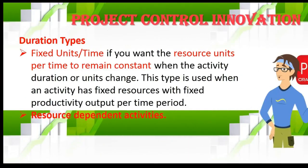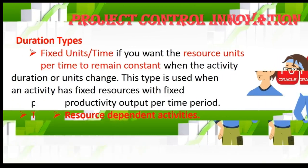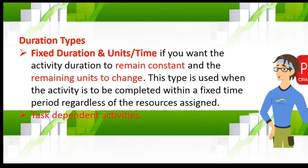Fixed Units/Time: if you want the resource units per time to remain constant — meaning the resource is constant — and the activity duration can change, use this one. This is a resource-dependent activity. Fixed Duration & Units/Time: if you want activity duration to remain constant and the remaining units to change, use this one — also a task-dependent activity.